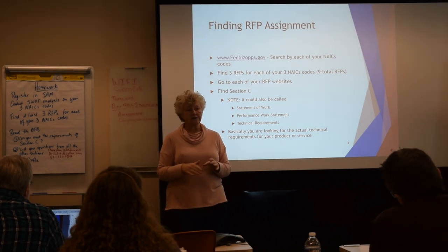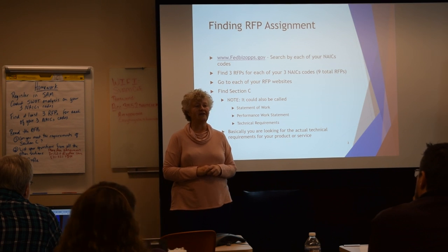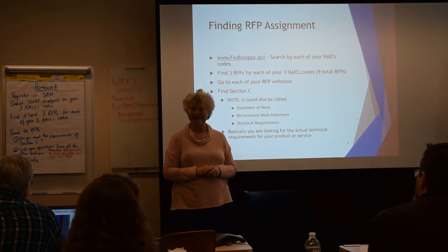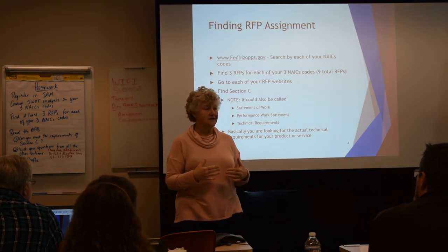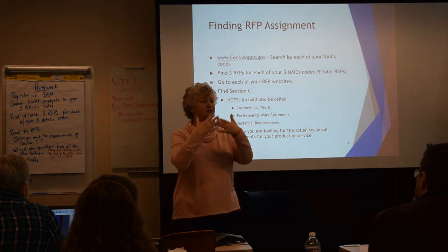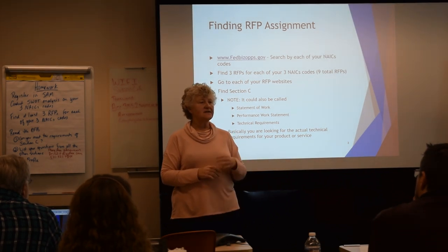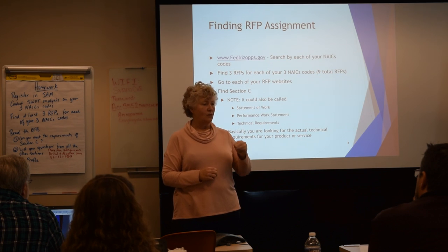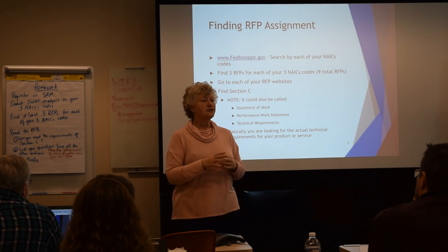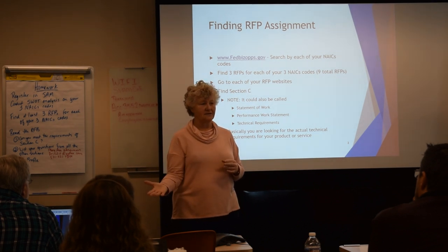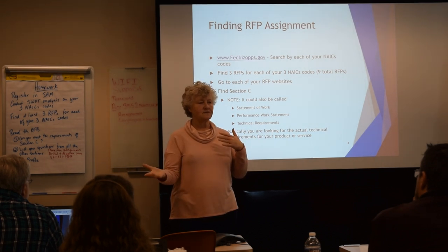So if there were any errors or omissions, whose fault was it? Right. How do you think the government felt about that? Huh? Right? So they decided to shift the risk from themselves to the contractor. And the way they did that was they went from a statement of work that's very much the thou shalt language to a performance work statement. So what's the difference between statement of work and performance work statement?